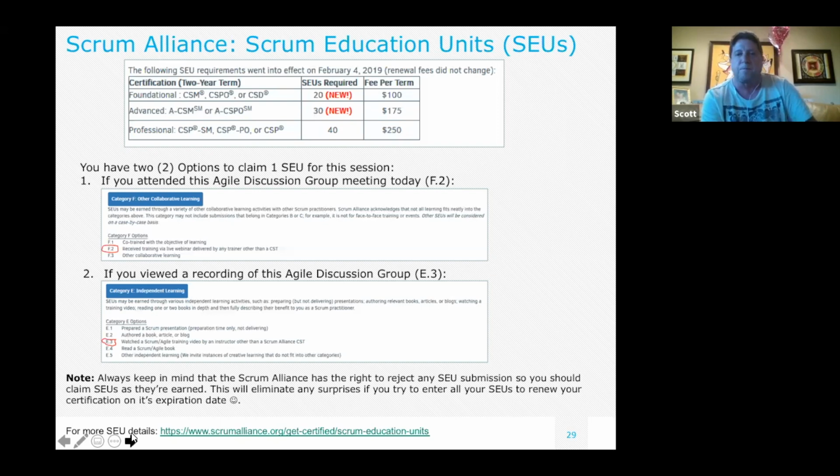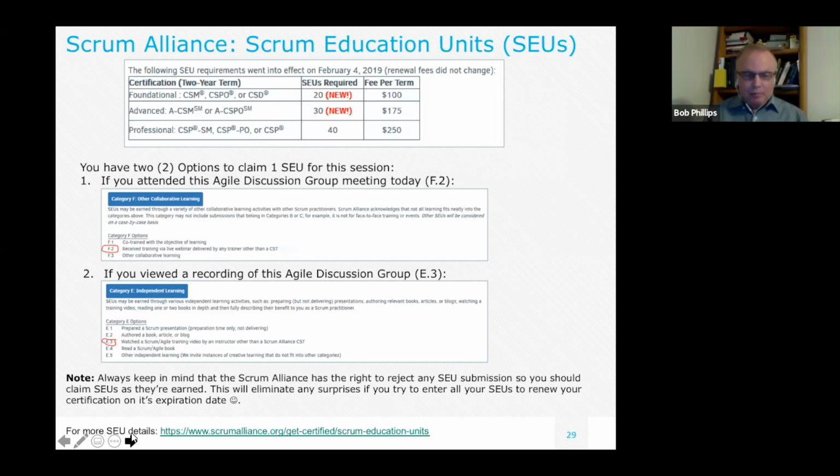Yeah, exactly. To do planning poker, you give everybody a deck of cards that are the Fibonacci sequence: 1, 2, 3, 5, 8, 13, 20, 40, 60. You talk about the requirement, what you're going to do. In this case, it was the question. This is the question we're going to ask. Does everybody understand what we're asking? Then the Scrum Master would say 1, 2, 3, show. Everybody at that location shows their card at the same time. You might get some 3s, some 5s, some 8s, 13s, and then you scan the room and look for the average.